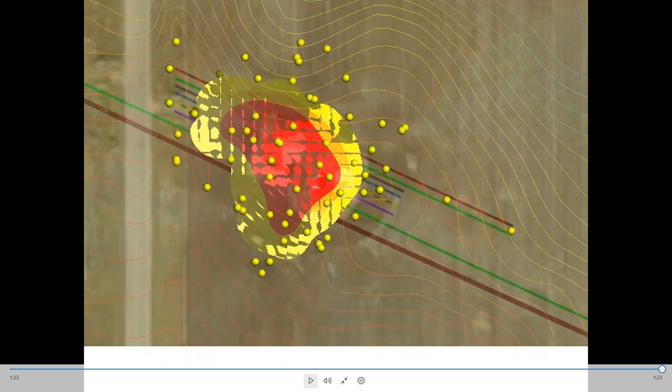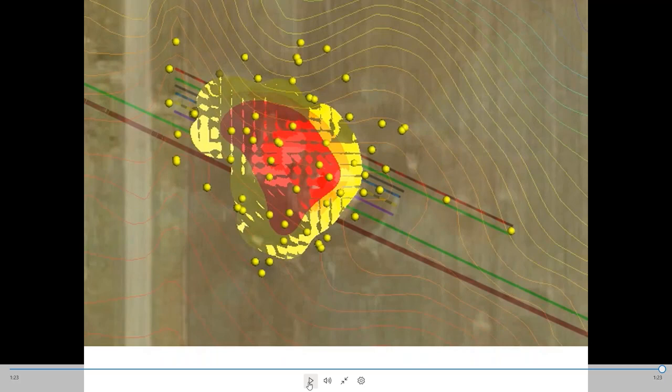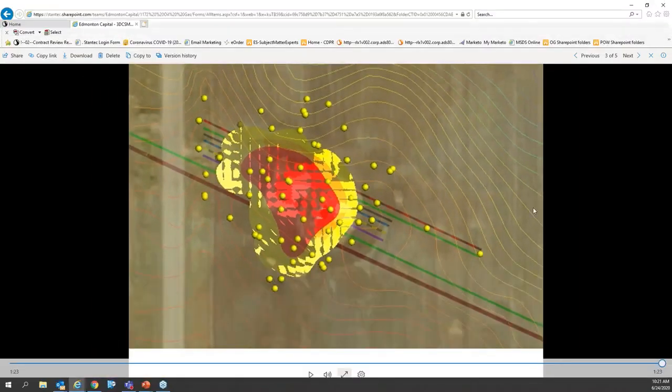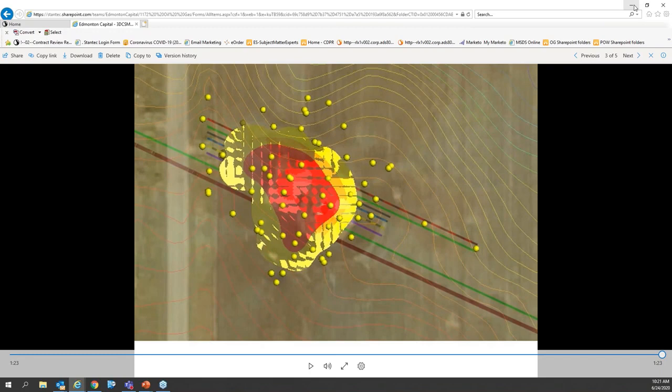With this in mind, we had it delineated and you can see that it's delineated on the east side of the highway. And once I presented this to the community, their sense of stress associated with the environmental impacts immediately went down. They could clearly see not through AutoCAD drawings or difficult to interpret GIS maps and tables, but they could see through a schematic highly visual means that due diligence had been taken and that the situation was under control. So with this in mind, they remediated it and the stop work order issued by the community was able to be removed and they proceeded with their work.